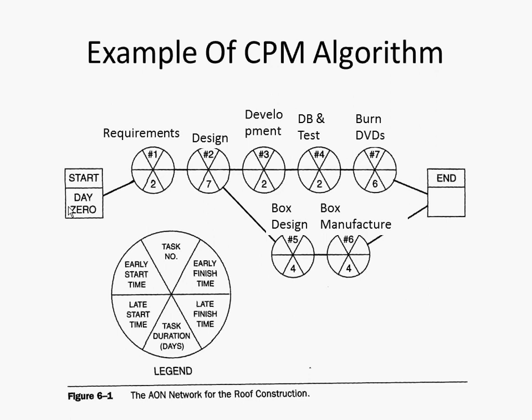Think through, okay, what things have got to get done, what are the dependencies between them, and which of these tasks, therefore, do we have to get on the ball right now? Maybe it's contacting the client, getting an appointment with Jenny Basran, because that may take 5 days to make, and if we do it next week, we'll be in a bad way because it probably won't come together by the final incremental deliverable deadline. Because after we speak with her, then we need to do X, Y, Z, and there might not be time.